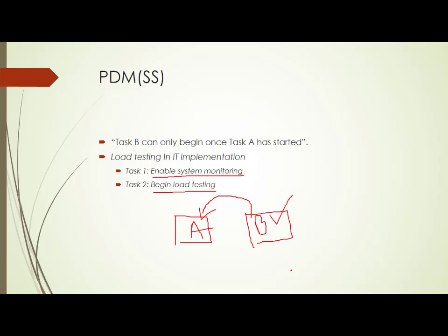So load test means, for example, your customer says, I want my e-commerce portal to support 1000 user logins at the same time. If you are doing load testing, you have to virtually create 1000 users using some testing tool. But while you are doing the load testing, something should be running in the background to see whether your e-commerce portal is actually supporting that or not. That is done by system monitoring. So a system monitoring tool should be enabled first, that is task A. After the system monitoring tool is enabled, then you perform the load test.